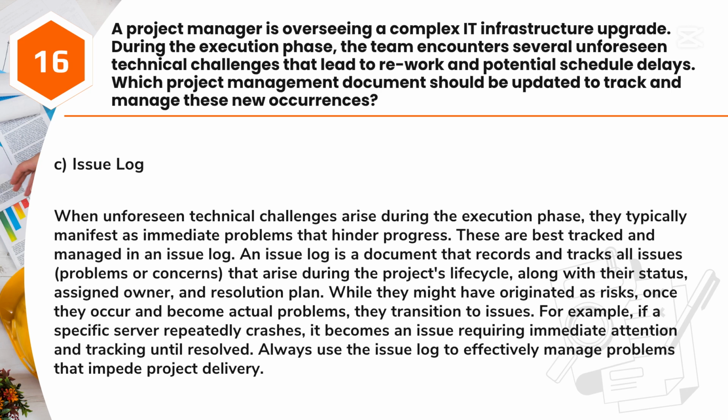While they might have originated as risks, once they occur and become actual problems, they transition to issues. For example, if a specific server repeatedly crashes, it becomes an issue requiring immediate attention and tracking until resolved. Always use the issue log to effectively manage problems that impede project delivery.